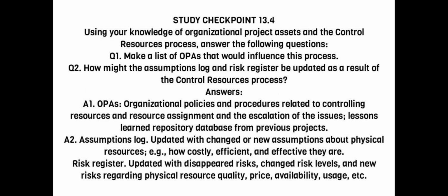Study Checkpoint 13.4. Using your knowledge of organizational project assets and the control resources process, answer the following questions. Q1. Make a list of OPAs that would influence this process. Q2. How might the assumptions log and risk register be updated as a result of the control resources process? Answers. A1. OPAs: organizational policies and procedures related to controlling resources and resource assignment and the escalation of the issues, lessons learned repository database from previous projects.